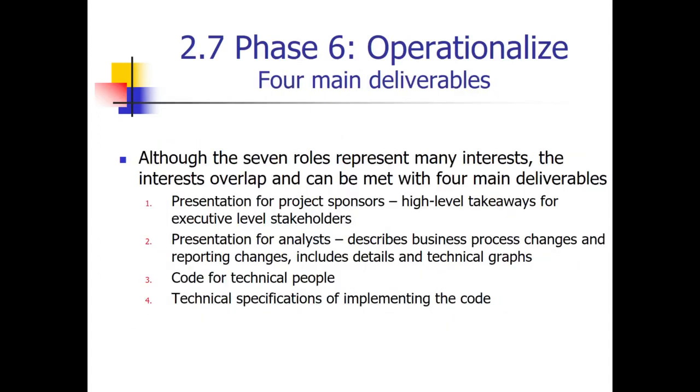These are the four main deliverables needed for the operationalize phase. One is the presentation for project sponsors. High-level takeaways for executive-level stakeholders are very essential. The second one is the presentation for analysts, describing business process changes and reporting changes. We have to give these presentations in PowerPoint.